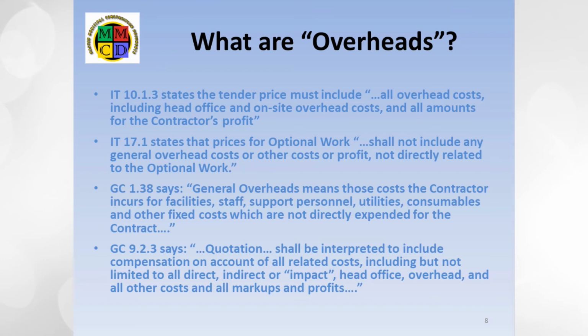Hence, my interpretation is that when force account costing allows a markup for overhead, it's to cover general overhead. If there are increased site overheads resulting from an authorized time extension to do work under force account, then those costs are legitimately reimbursable item by item, before the 10% allowed for general overheads.